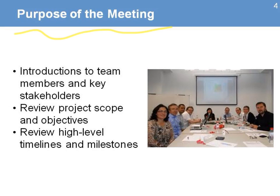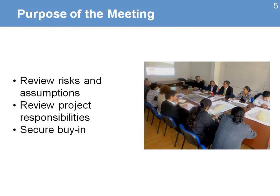The purpose of the kickoff meeting — why we need one — is that it's an opportunity to make introductions to team members and key stakeholders. It's also an opportunity to review the project's scope and objectives, and review high-level timelines and milestones. You also spend time to review risks and assumptions made on the project and responsibilities. At the end, you make sure you are getting buy-in, meaning the people participating, whether directly or indirectly with the project, have a good understanding and are willing to provide their support.